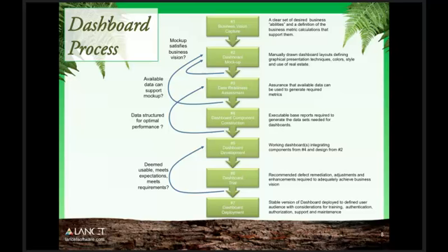Then once we complete that, dashboard component construction, that's where your architect or your dashboard developer will build the data sets and make sure those are good. After that, we do the development of the actual dashboard, where we integrate the components, the data sets, along with the dashboard mock-up, and we go through a dashboard trial with the customer. And we ask ourselves, does the dashboard meet the business vision we set? Is it usable? Is it good looking? Is it easy to use? If not, maybe we need to tweak the development. 5 and 6 are pretty iterative, and that goes through a long phase, your testing phase, if you will.